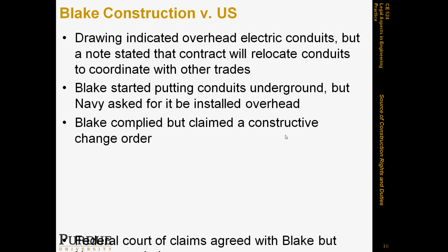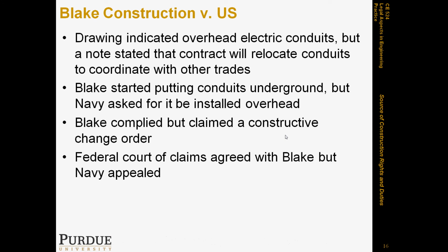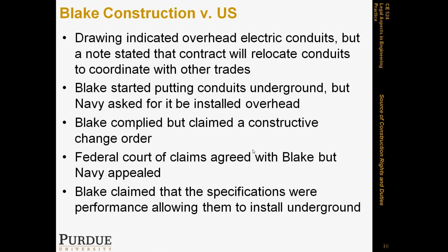And at the first level of litigation, the Federal Court of Claims agreed that Blake basically had the right to that amount that they claimed, and there's basically a constructive change order. And the Navy appealed, and at the higher court, the Court of Appeals, they basically had their day also. They went and presented their case.